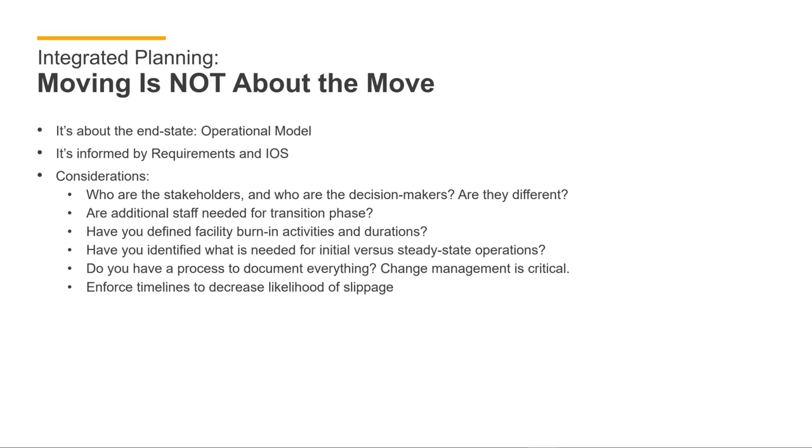The other thing that's important is to enforce the timeline. If you say that you're going to do something by this point, or you're holding somebody accountable to execute part of a transition, enforce that, not only to protect against slippage to the right, but you also don't want to set a precedent that it's okay to continue to push things to the right.